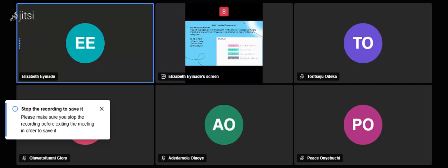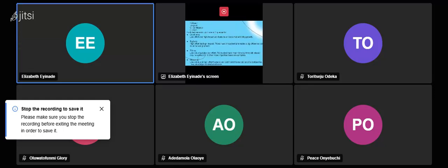All right, so another one is the prioritization frameworks. We talked about four prioritization frameworks. The first one is the MoSCoW method, where you categorize your features in order of importance using must have, should have, could have, and won't have. Won't have are those that you will not build, and could have are all the nice-to-have features. Should have are of high value, but the must have must come first. You have to plan properly for it.